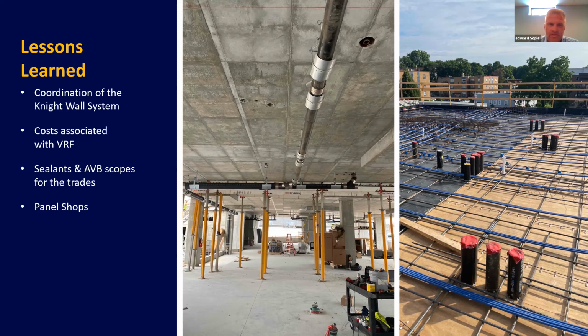And then our contract drawings also have all the sealant that we talked about previously. It has to be done. We have a separate contractor that's going to be responsible for that. And then from a GC perspective, we also added a full-time field assistant superintendent who's going to be our passive house superintendent from start to finish. We're not going to break it up.